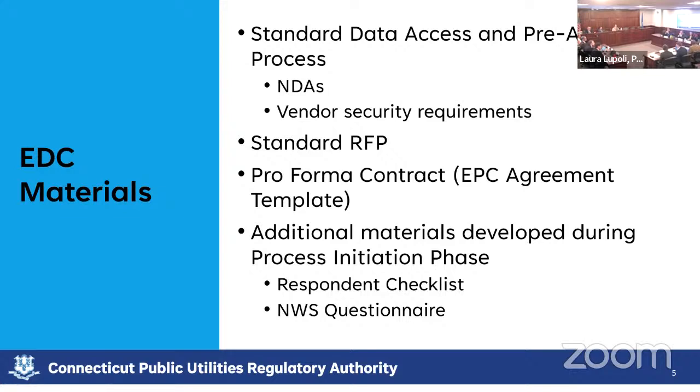It's Adrian Caesar with the process monitor. We believe the only other substantive point of feedback the process monitor had was related to the EM&V plan that was described in the design document. In review of draft materials, we noticed that the pro forma contract didn't include language around an EM&V plan, so we wanted to make sure that those provisions were included in the final pro forma contract.